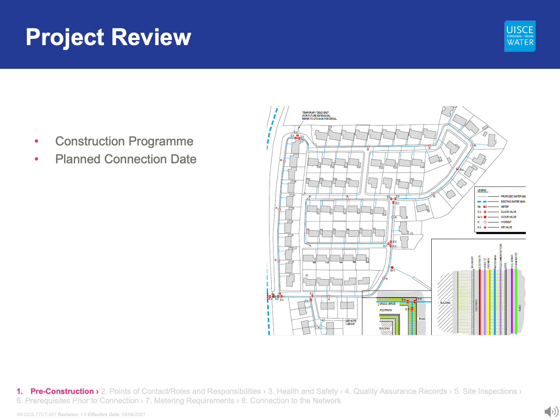This is important so that Irish Water's delivery partner can apply to the Roads Authority for a road opening licence if required. This process can take a number of weeks. If a temporary connection is required, the developer should have submitted a temporary connection application to Irish Water. The developer should point out any complexities to the field engineer.